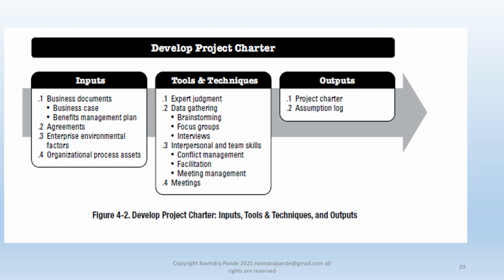And no disrespect to him, he also tried very hard to work with me, because I was a project lead and he was working on these Tuxedo services at that time. So it's a crucial part of the whole architecture. So here we keep learning, but whatever you assume, you need to document it. And based on that, we create something like risk. For every assumption, there's a risk.